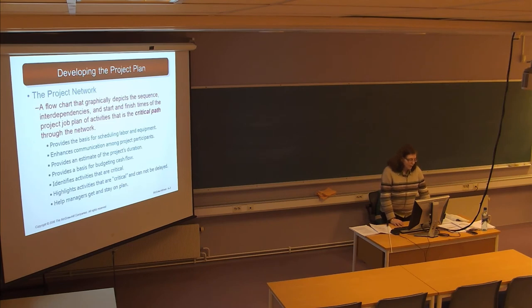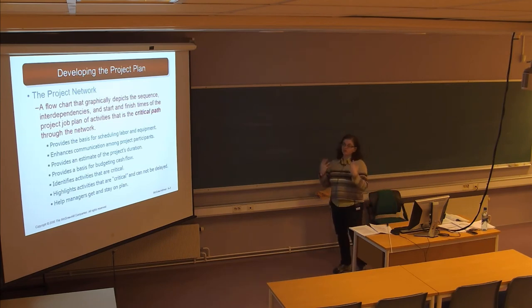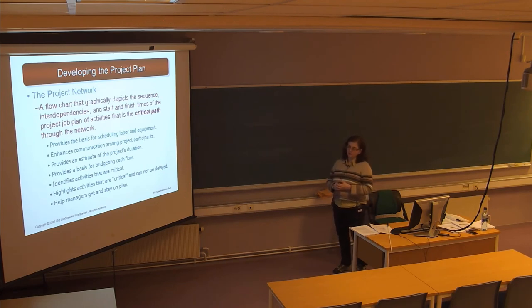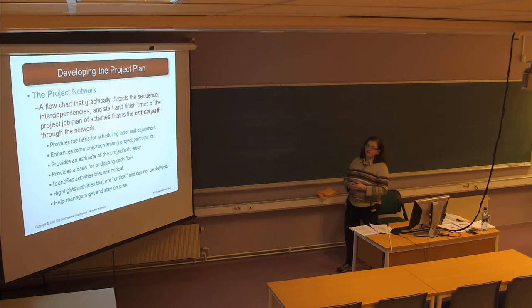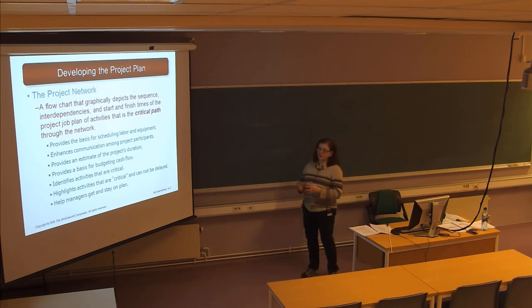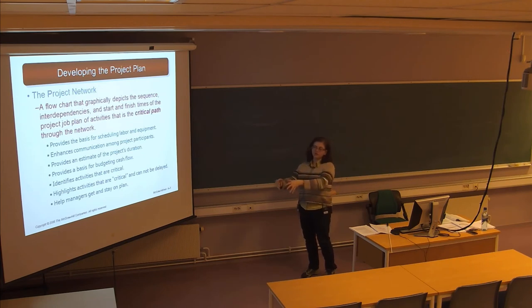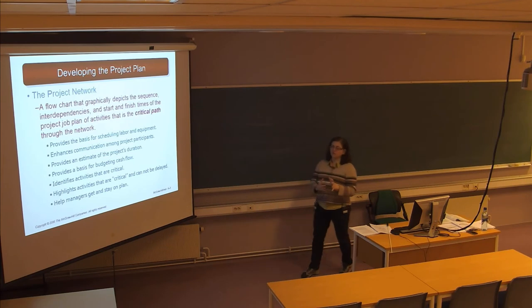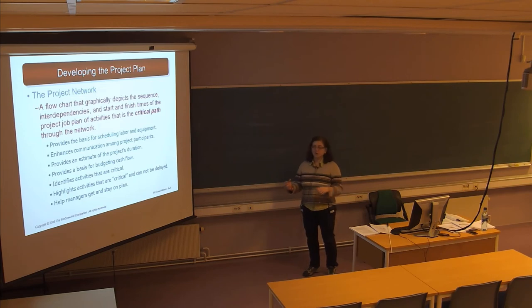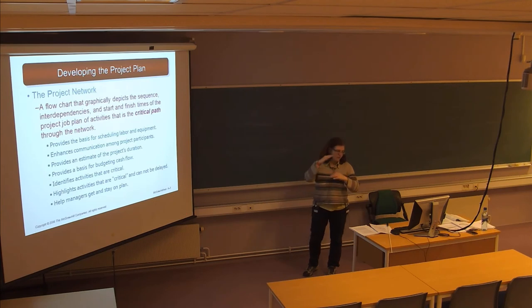What we are going to talk about today is the project network. This is basically a flow chart that shows the interdependencies of the activities that have to be done in the project. It's very important because it helps the project manager understand what the critical path is through the activities. Once you get one activity done, you're clear to start the next activity. There's a chain of activities that have to happen — sometimes this chain is serial, one at a time, but some events can be happening in parallel.